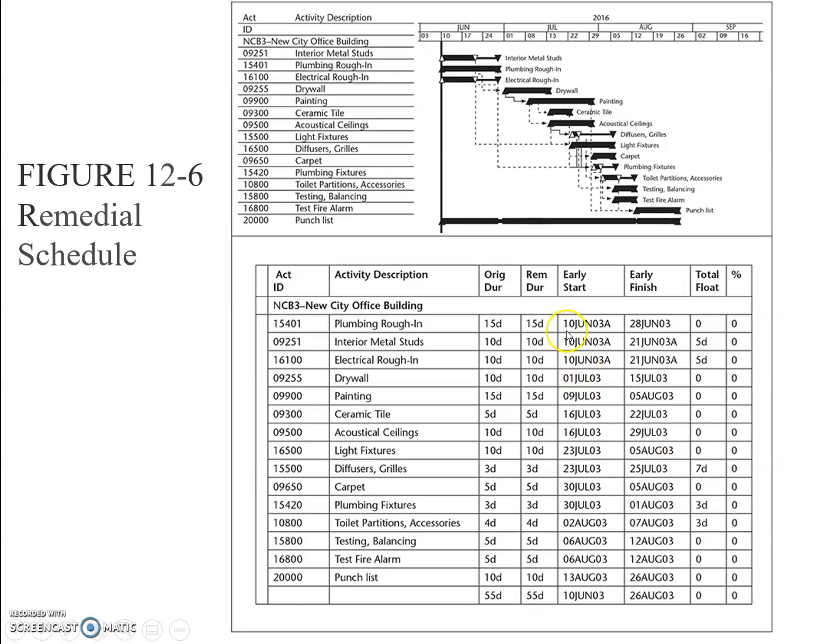As a result of the updating, if it is found that the project schedule is getting delayed, that delay has to be remedied, and the project must be brought back to its original schedule. So the crashing of the activities is done to reduce the duration of the activities on the critical path, and then bring the project back to its original or agreed upon completion date.